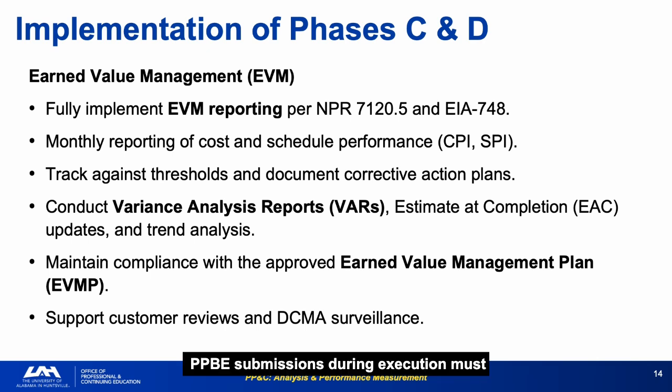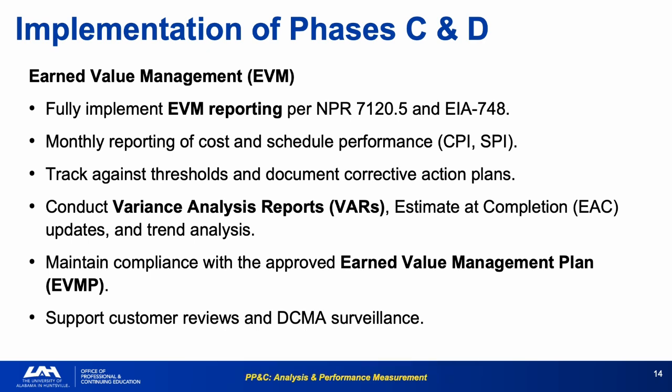PPB submissions during execution must stay aligned with updated resource needs. The budget and the work must remain connected throughout implementation. If your PMB does not reflect approved changes, you're measuring performance against a baseline that no longer represents the actual plan.